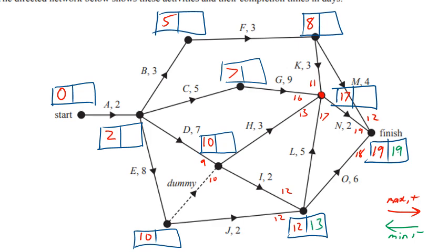Going back up, there's only one arrow, I think, if I'm getting that right. So 19 minus 4 is 15. And then, oh dear, there's a lot to this, isn't there? 19 minus 2 is 17. So that's good because we need to do something on the critical path.